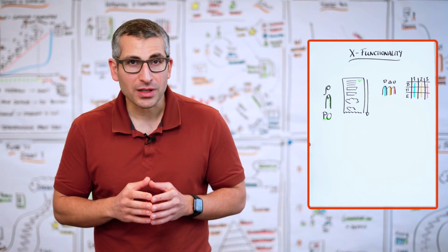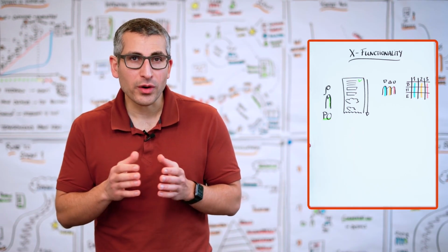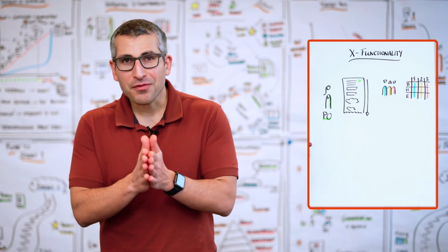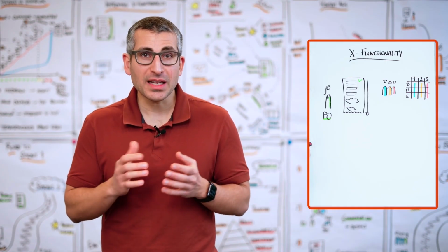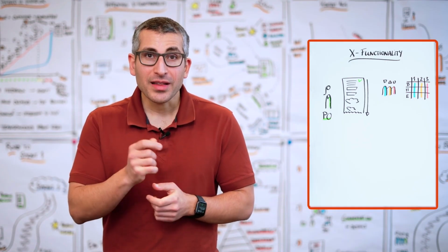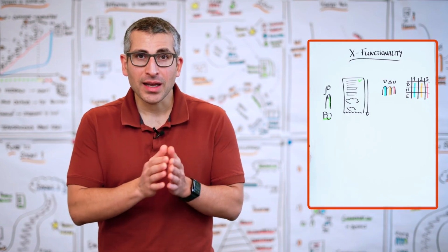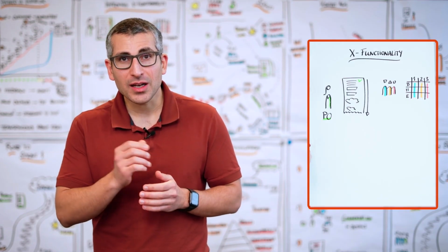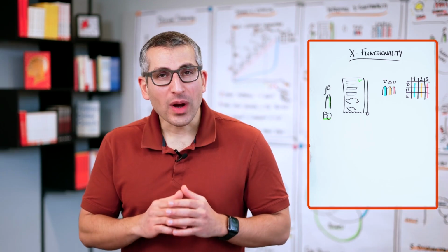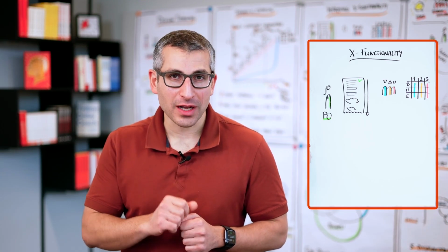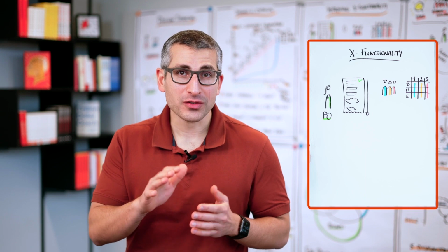This time, unfortunately, let's say our orange person, team member 2, says, the first item is around 80% of my capacity. The second item would be another 60% of my capacity. 80 plus 60 equals 140. So what happens in that scenario? Maybe you need a few moments for yourself, and ideally you can pause this video.